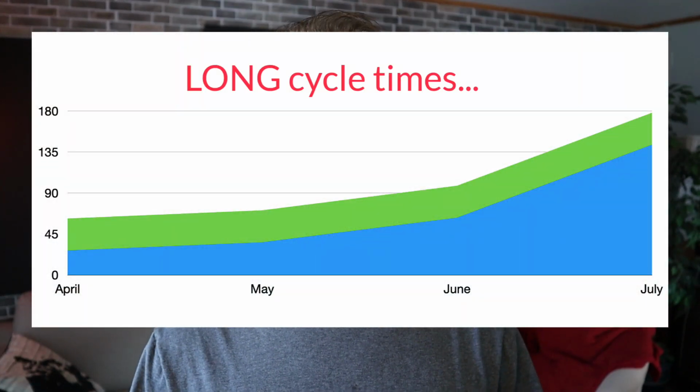So I'm going to say a little bit more about maximize flow because, again, that's more of an art than it is a science. You want work to be flowing across your Kanban board, and a CFD diagram is something that gives you the diagnostics so you can see what your flow looks like. So a flow that looks like this is a healthy flow. That shows that work is moving across the board and moving into the done column, and a chart that looks like this is unhealthy flow. So that just shows that stuff is getting stuck somewhere, and you need to do what we call elevate the bottleneck. So find out where things are getting stuck, and then try to figure out how to get them unstuck.